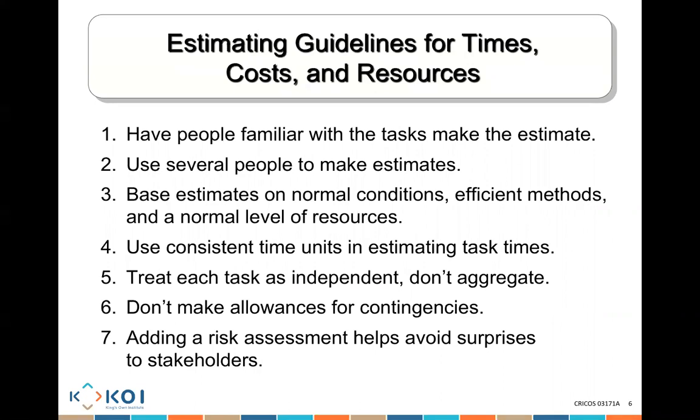Use several people to make the actual estimate, because one person might get it wrong, but with many people, it's unlikely they are all going to get it wrong. Base your estimation on normal conditions, efficient methods, and a normal level of resources. Don't say, oh, I can do this task in 1 day because I'm going to employ 3 people. No, don't do that. Just base it on normal conditions, efficient methods, and normal resources.